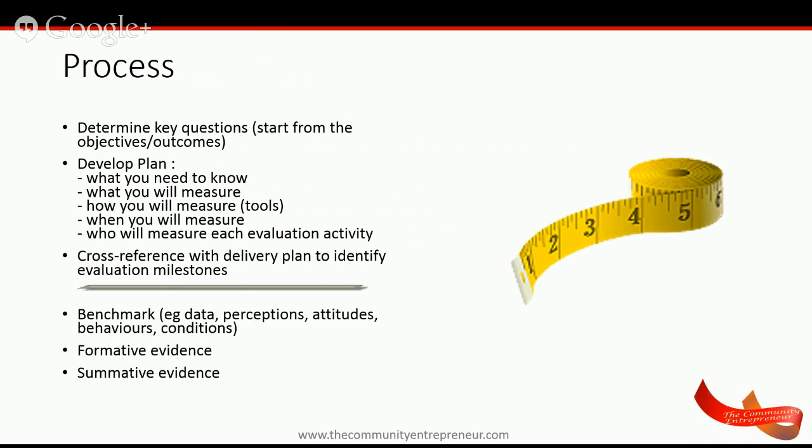Then you might want to develop a plan. And the plan may have the following headings. Based on those questions, what do you need to know? What you will measure, how you will measure it, so the tools that you will use, and we'll talk about those. When you will measure that, and who will measure each evaluation activity. So it could be that you may want to know, for example, just off the top of my head,